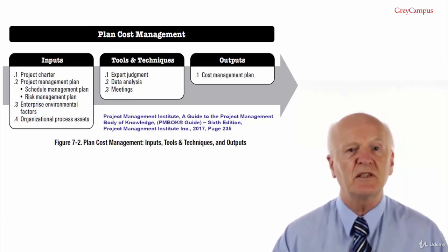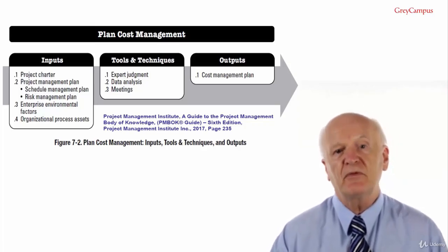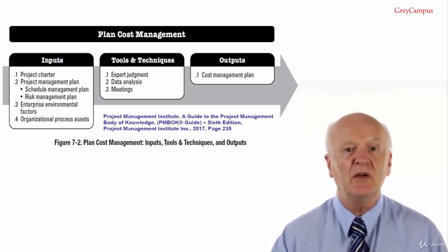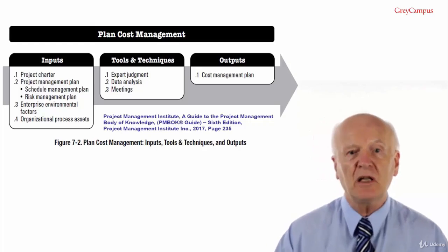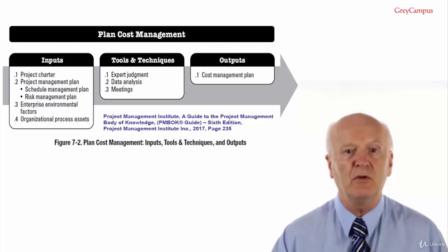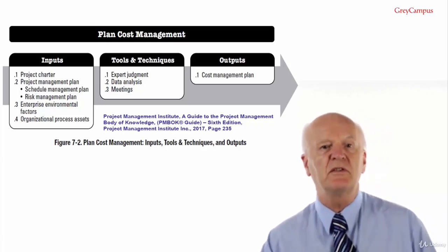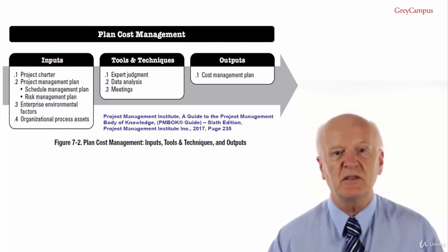It's used in determining realistic cost estimates. And please remember for the exam the difference between the two. Precision means number of decimal places. Accuracy means how close the number is to the expected value. It normally has a range involved. Organisational procedures links. This may be where to find details on the procedures.